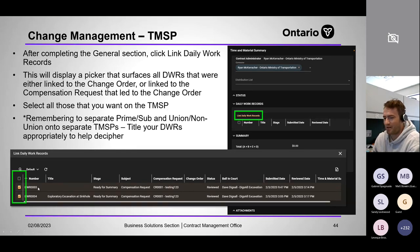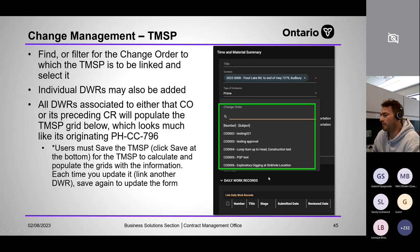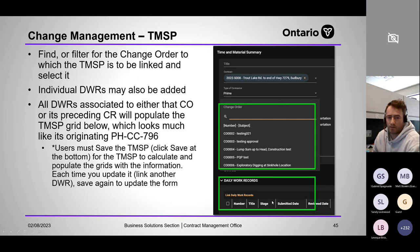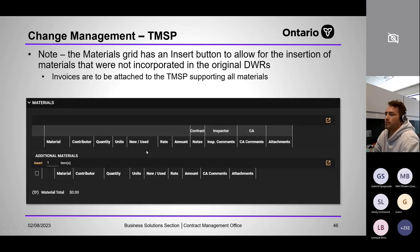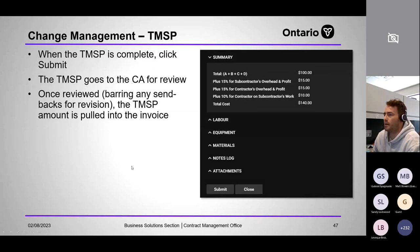In the change order section, select prime or sub, choose the change order, and link daily work records. You can also link individual DWRs for one-offs you might have missed. In the notes section there's a materials grid — materials should be supported by an invoice where possible. When completed, click Submit or Save — it auto-calculates and shows the total of that individual TMSP. The TMSP is then pulled into the invoice and sits there, enabling progressive payment without changing or closing the change order.